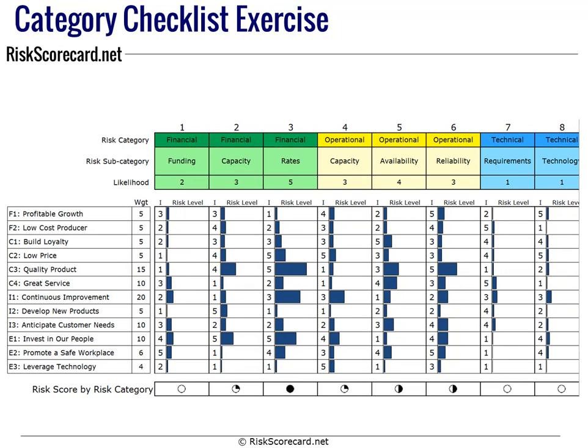And so based on that, we'll be able to multiply the weighting by the impact to produce that little bar chart. The length of the bar represents the strategically weighted impact of that risk. So what you'll see if you look horizontally is things like product quality has a risk that seems to occur across multiple categories. So that overall objective is probably at risk, whereas others like developing new products doesn't seem to be too risky for this organization based on the subset of categories that we're looking at.